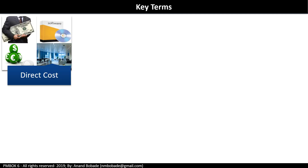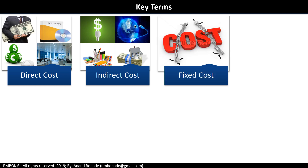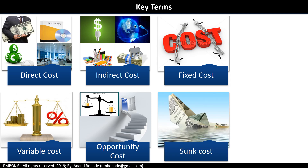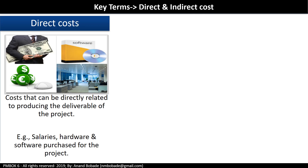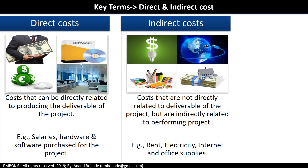Let's look at some financial terms you need to understand for the exam. Direct cost is a cost that can be directly related to producing the deliverable of the project — for example, salaries, hardware, and software purchased for the project. Indirect cost is a cost not directly related to the deliverable but indirectly related to performing project activities — for example, rent, electricity, internet, and office supplies. Some examples may fall in either category based on context — for example, rent can be a direct cost if the entire office premises is rented for a specific project.